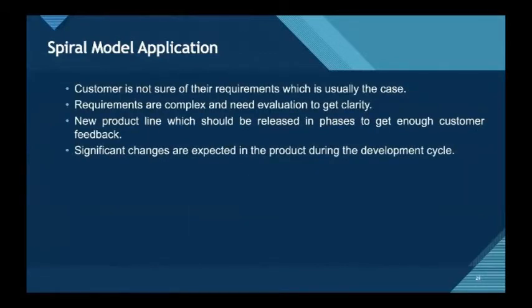Customer is not sure of the requirements, which is usually the case. Requirements are complex and need evaluation to get clarity. New product line which should be released in phases to get enough customer feedback. Significant changes are expected in the product during the development cycle.